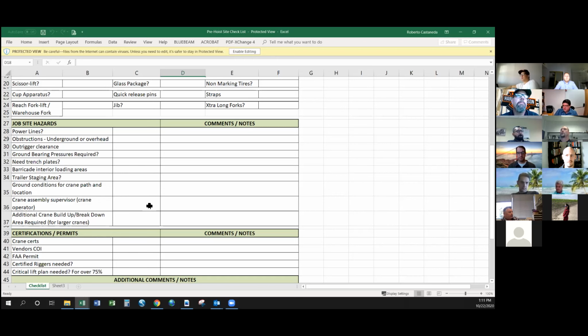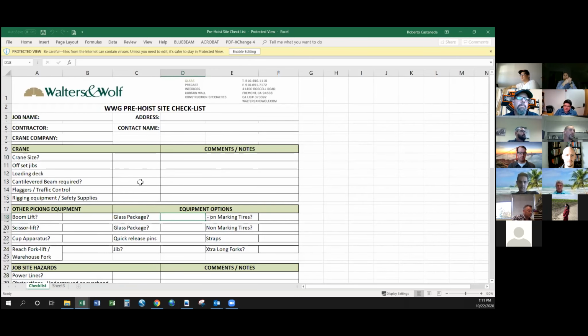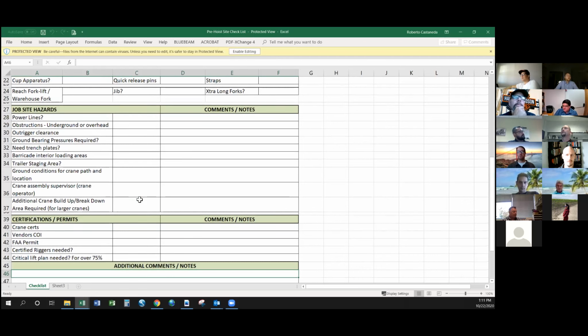Great. Thank you, Brian. Since this happens early on in the job, it is going to be filled out with all the particulars for the job. If the field personnel need to go back and look at some of the special comments on each of the line items, or add any other comments that the PM needs to watch out for, like special permits, that is going to be there, available for all of you. Each of the items you're looking for has drop-down menus so that you can fill it out, or you can print it and fill it out by hand at the job site.